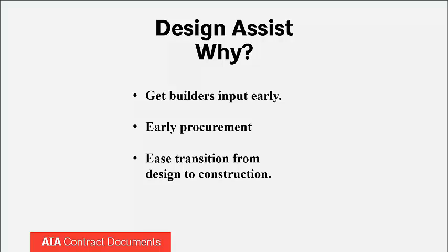Everybody on this call here has probably worked on a project where it's been the design, bid, build traditional scenario where the design team is somewhat working in a vacuum. They're coming up with their designs, putting together a full set of construction documents, and then bidding the project out. And as soon as the construction team starts to get familiarized with the drawings and specifications, there's a bit of a difficulty in actually onboarding and understanding the project. And oftentimes you'll have a handful of RFIs right up front from the construction team trying to get on board with the project and get up to speed with things.